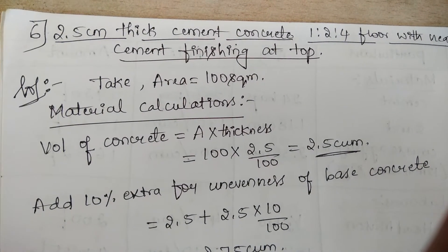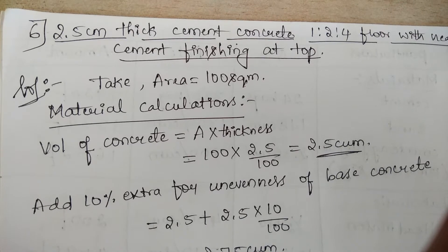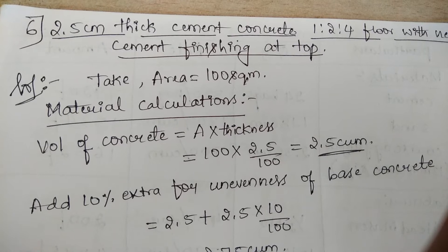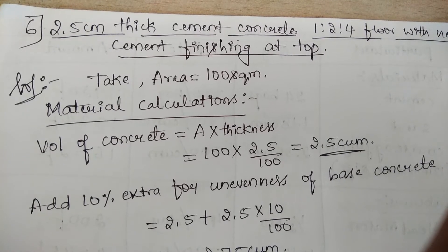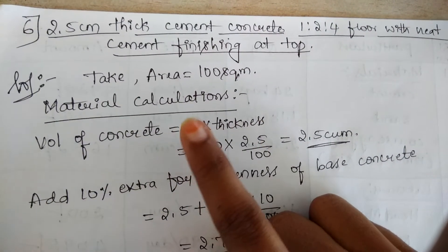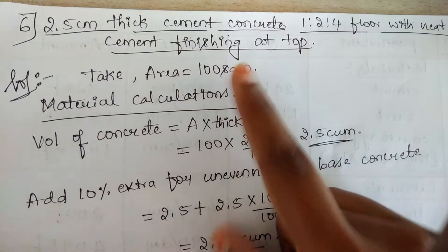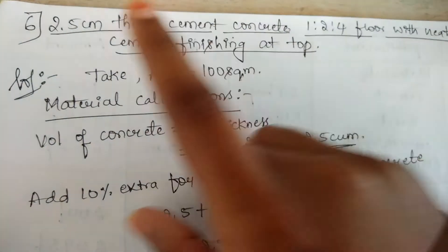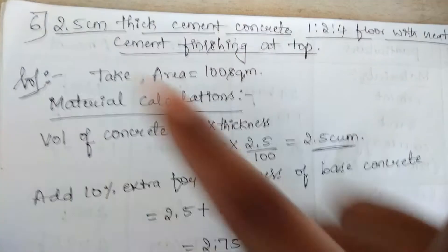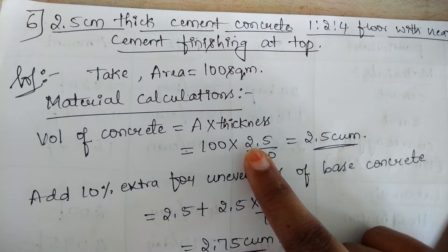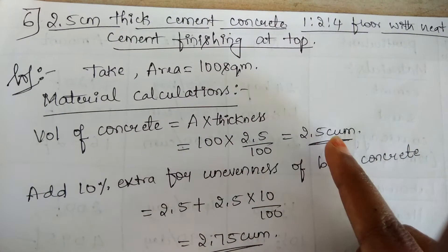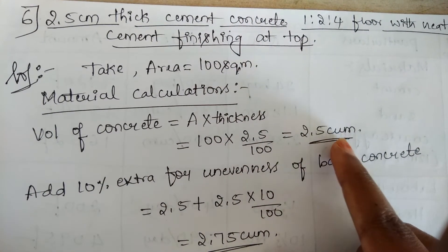Let us consider an area of 100 m². Now we have to do the material calculation. To find the volume of concrete for an area of 100 m², the volume will be found out by multiplying area with the thickness. Here the area is 100 m² and thickness is 2.5 cm. Convert that centimeter to meters by dividing by 100, so on simplifying we will get a value of 2.5 m³.